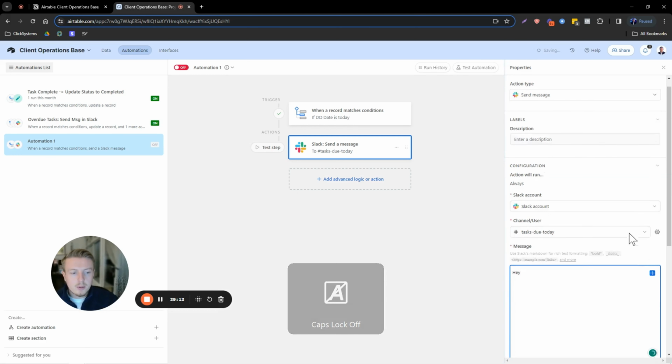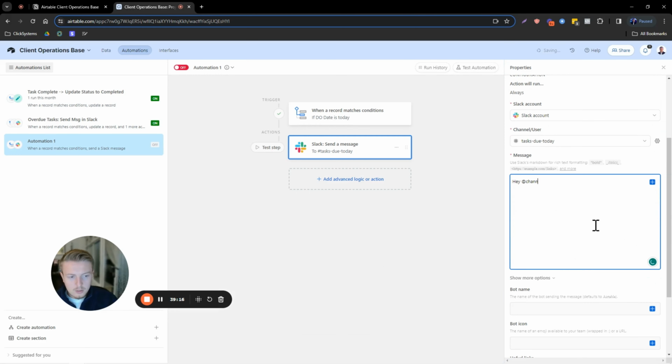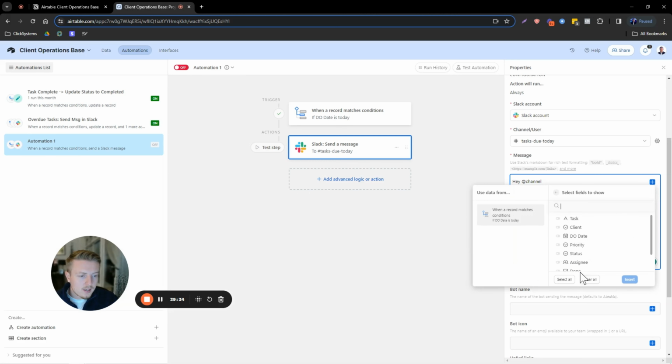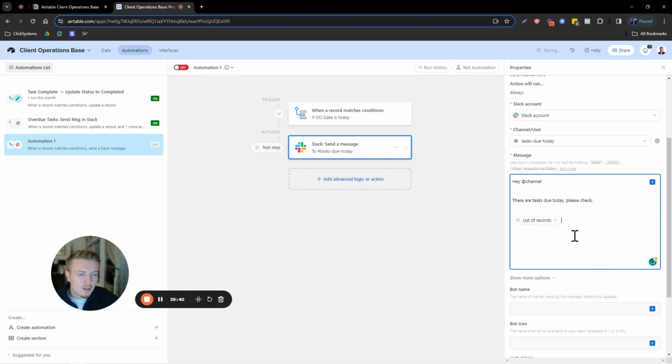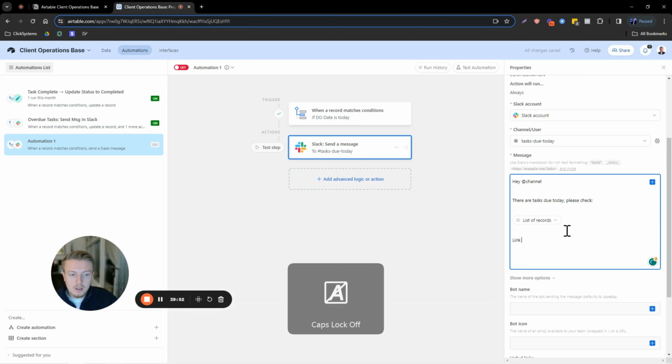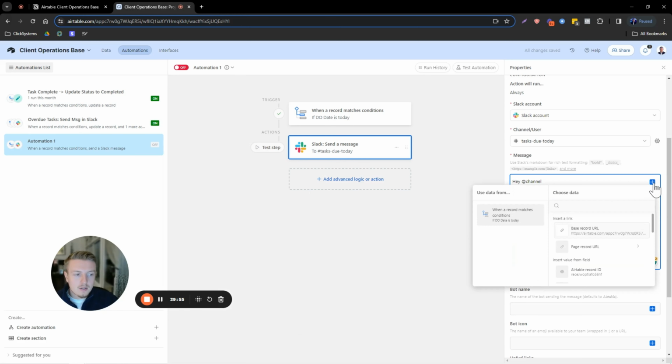Again, we're going to put in our message: hey channel, there are tasks due today, please check, something simple like that. You can really customize this however you want. I'm just showing you the overall base and the infrastructure of the system that you can put in place. Then here again, we're going to list. Scroll down, click on list, and select all the tasks for the client, the due date, the priority status, and assignee. It's going to pull not just one task that is due today, it's going to pull all of the tasks in your client operations base for all of the clients that are in there, and put them into that Slack message. Then we're going to put the link to Airtable again, so the team can just pull it up.